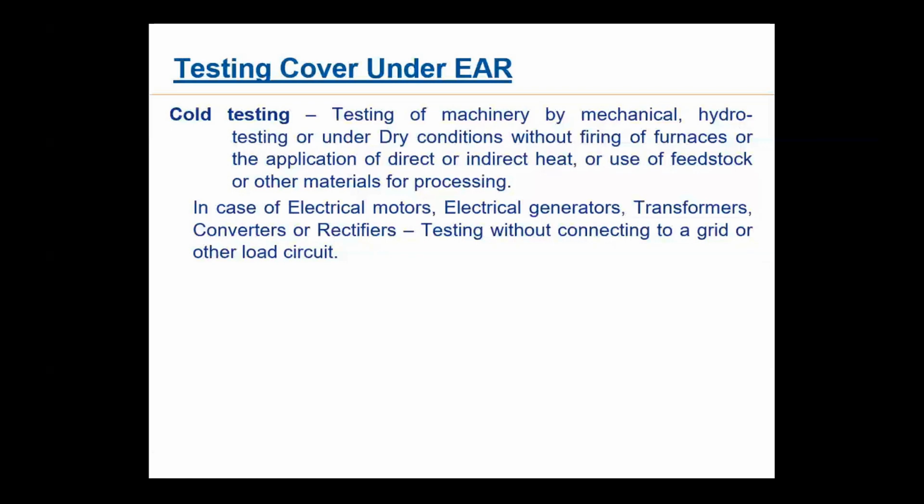Under dry conditions, without firing of furnace. That means no firing is done. Firing means you are not supplying any heat, you are not putting it on fire. Boiler is not fired. If you are using a furnace, etc., then it is not cold testing. Then it will be hot testing. Or application of direct or indirect heat. No heat is to be provided. Only cold testing, no heat.